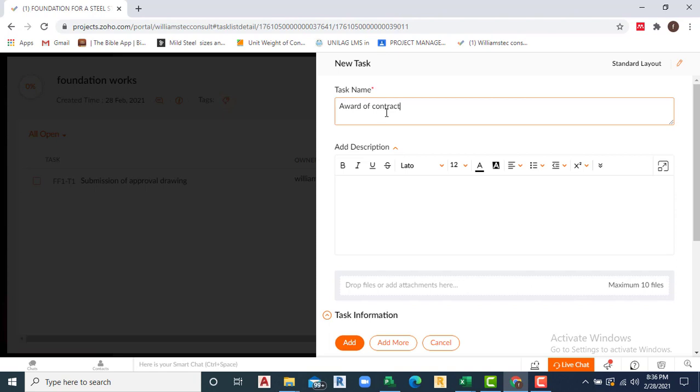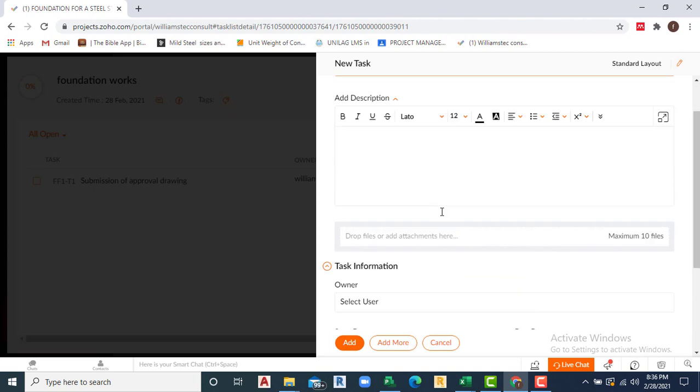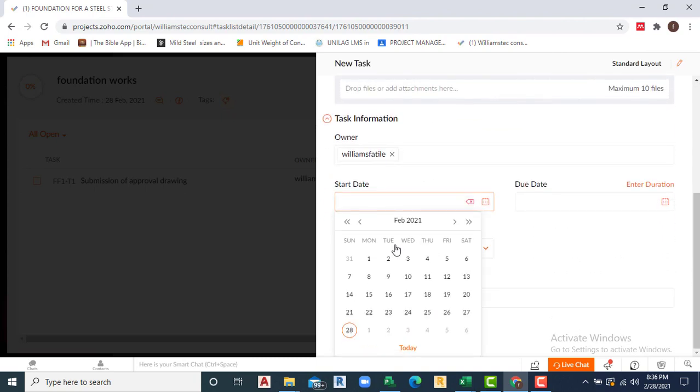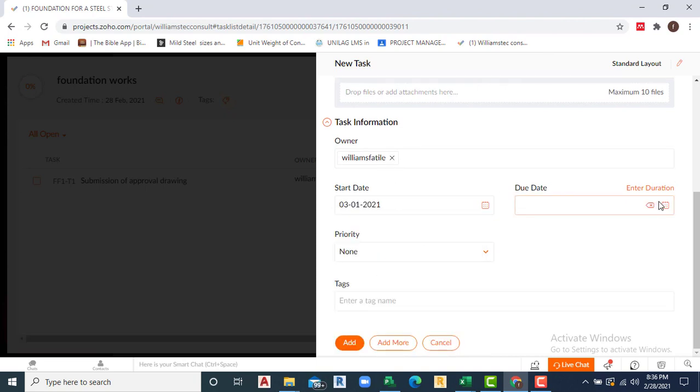By the time you have done all your drawings, while you are waiting for the approval, you can use that opportunity to award your contract.